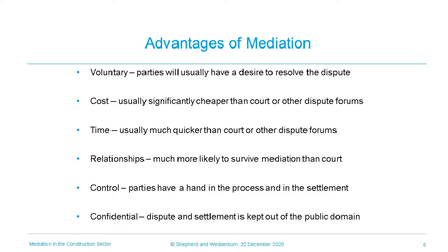We can see that there's a theme here. Most of the benefits of mediation have a cost benefit attached to them, which can be a significant factor when considering settlements. Despite its modest cost and short time frame, mediation is still an appropriate forum for resolving all aspects of a complex dispute. This can be contrasted with other dispute resolution mechanisms which proceed within a short time frame, such as adjudication, where a large complex dispute should be broken down into more manageable pieces.